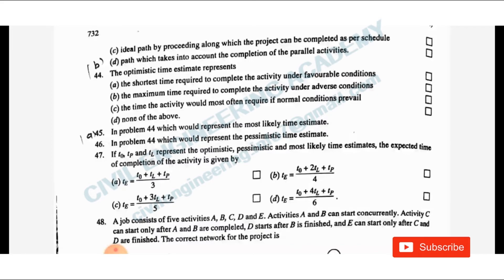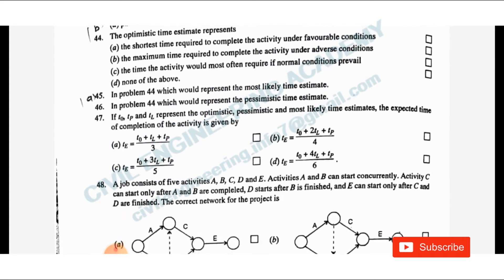Question 47: If T0, Tp, and TL represent optimistic, pessimistic, and most likely time estimates, the expected time of completion of the activity is given by the formula: Te = (T0 + 4TL + Tp) divided by 6. This is the PERT expected time formula to remember.